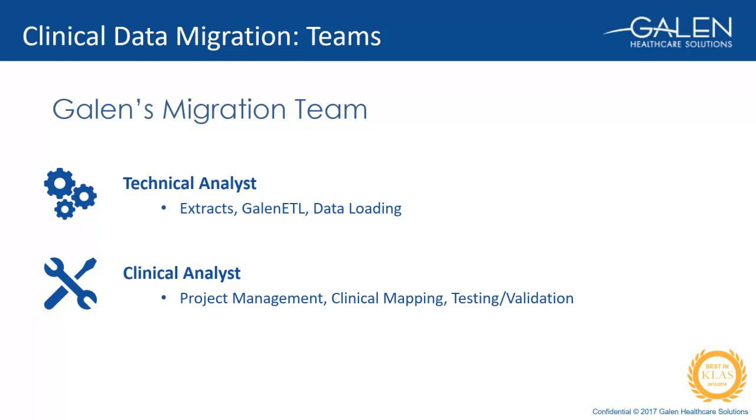The clinical analyst is also the project manager for the migration. They do the mapping of each data element from the source system to the target system and participate in testing and validation of the clinical data. The technical analyst and clinical analyst work together to resolve issues that come up during the testing phases and communicate closely on all decisions made through the migration process.